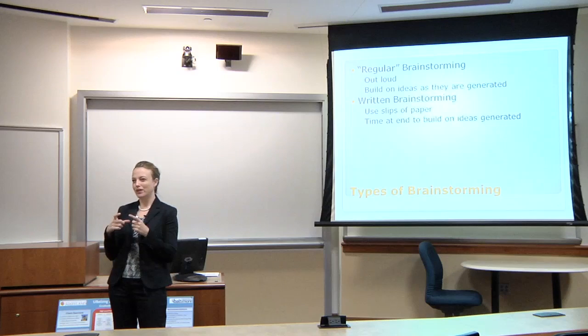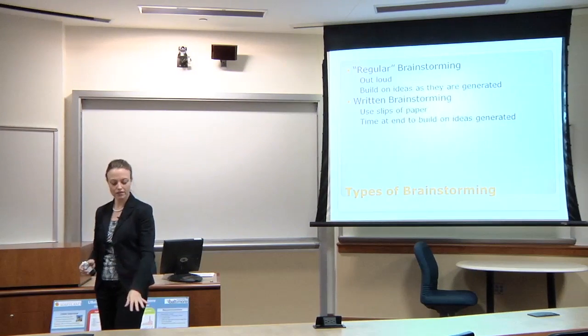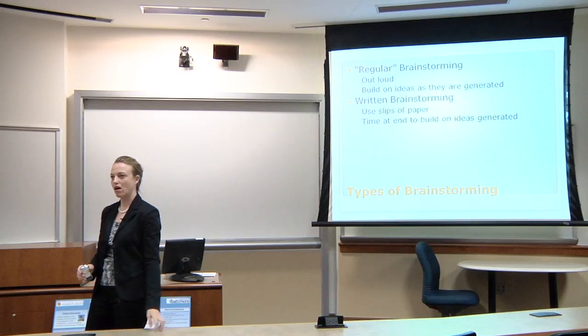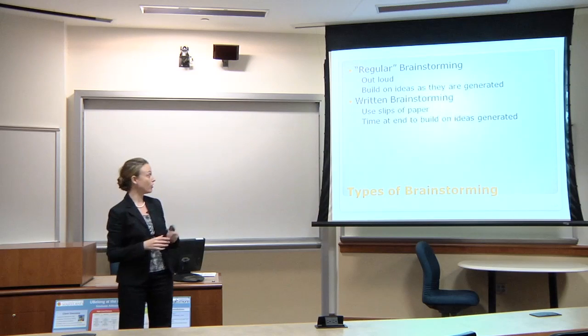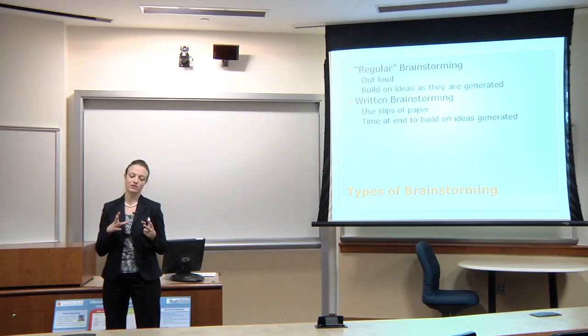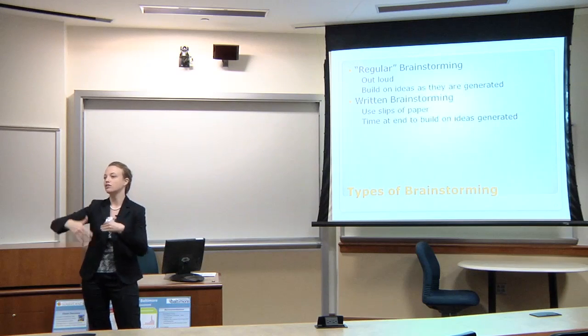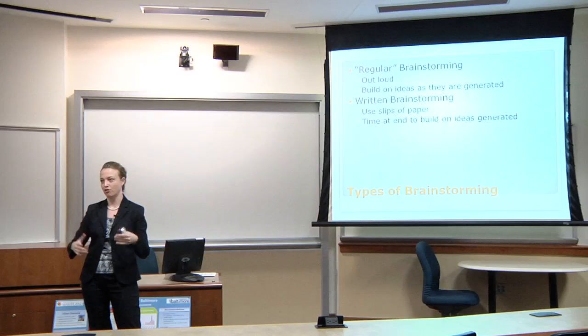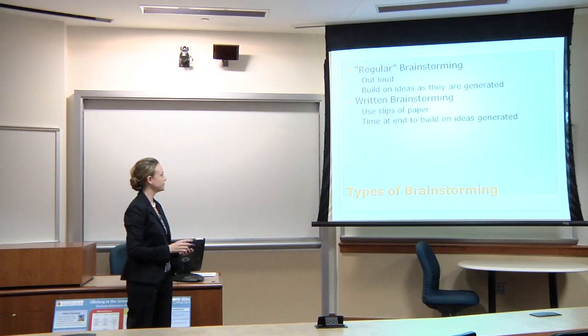But I like the written brainstorming because it gives you a chance to come up with ideas individually. And what's cool is that you may have three team members that are all coming up with similar ideas, and that way you know that you're on the right track. So if you're doing it that way, then you probably want to set aside five minutes for individual brainstorming and then five minutes for us to build on each other's ideas. Let's all shout out, let's all tell each other ideas and then build off of each other and maybe do a second round of brainstorming new tasks. So you come up with this whole list of tasks.